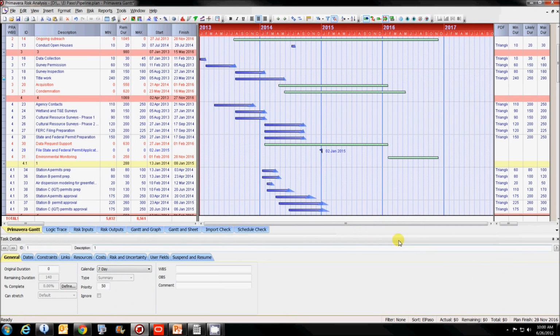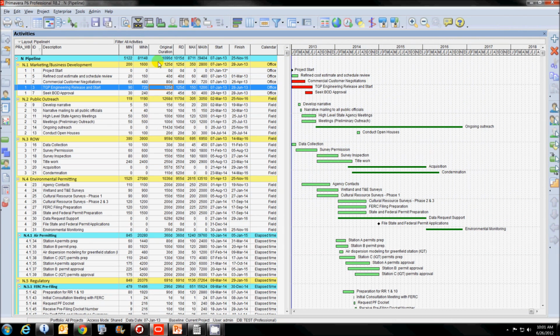So that's basically it, and I'm overusing the word basically, but the stress here is that it only applies to level 2 schedules, those schedules for which you have made a direct attribution of a range. If you haven't, then everything's going to be done in percentage, and it probably doesn't matter.